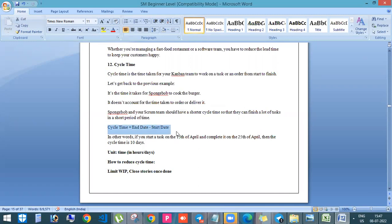Cycle time can be, for your understanding, I can tell like it's end date minus start date. So if a team, if someone is starting a task on 15th of April and completing it on 25th of April, that means that the time taken is 10 days.